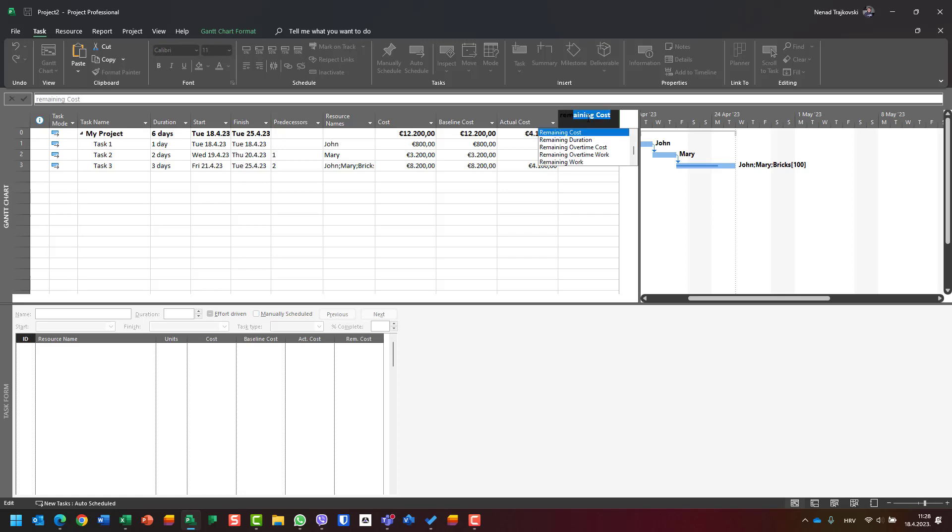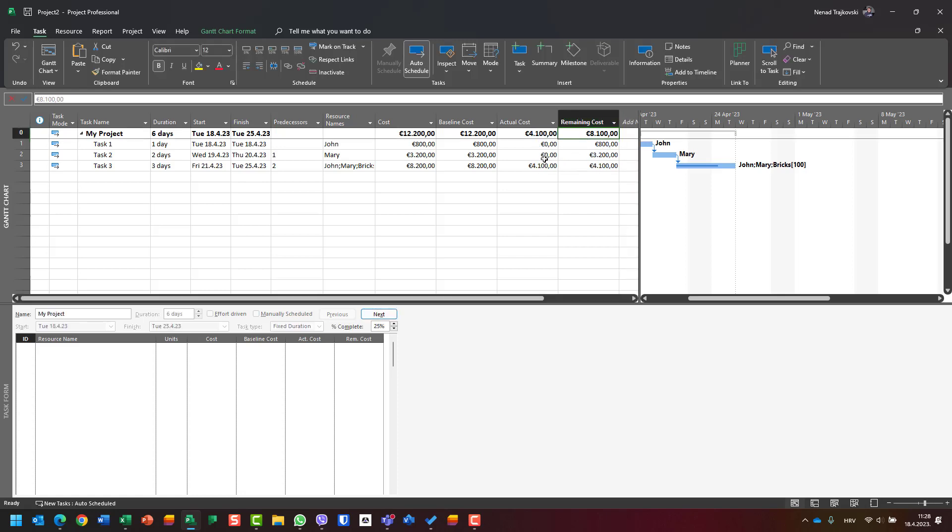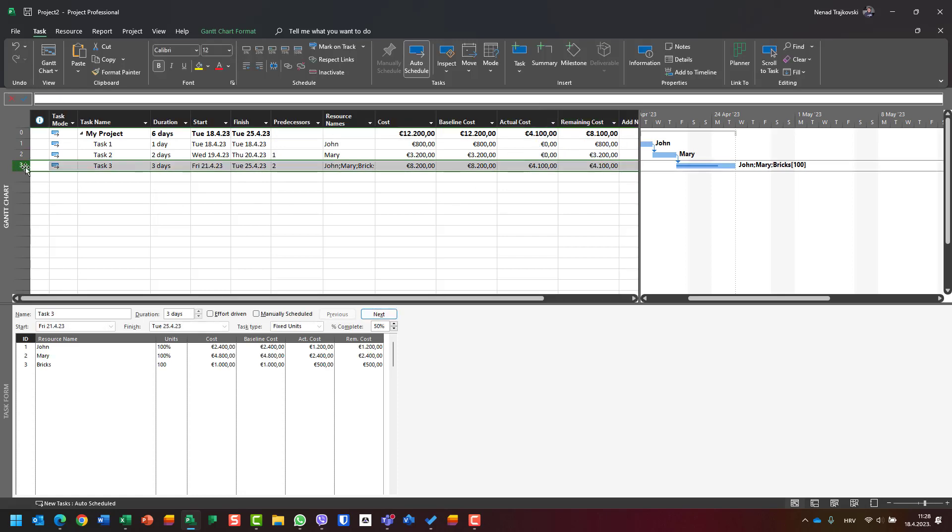The baseline cost is 8200, the actual cost is 4100, and the remaining cost is 4100. But by using the Task Form, I can see how those costs are distributed per resource, and that is very useful.